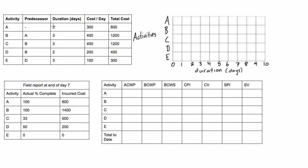Activity A has a duration of two days, so we'll draw it in just like that. Activity B's predecessor is A and it's three days long, so it will start here and go three days out. Activity C depends on B and it's three days. Activity D also depends on B and it's two days long. Activity E depends on D and it's three days long.